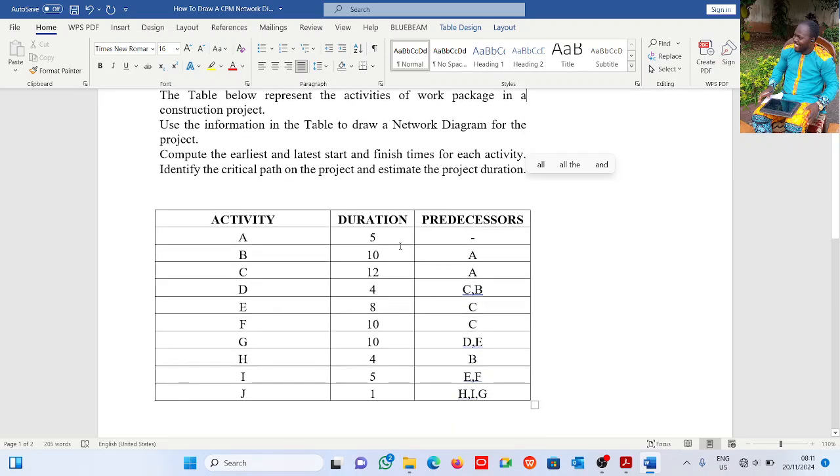If you remember in PERT, project evaluation and review technique, we have 3 different estimates. That's one of the differences. This one is a definite time estimate. The other uses an estimated time duration, where you have 3: the pessimistic, the optimistic, and M. What's M called again? Most likely, I got it. Most likely time.